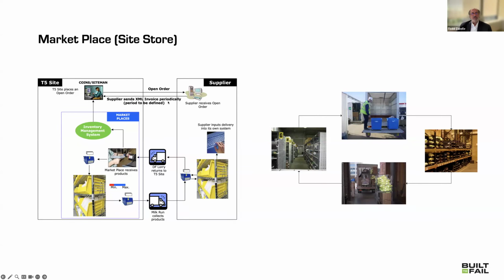But a purchase order was not the signal to ship something. A purchase order was the signal to transact. And I think this is what Dave was talking about, a relational contract that says, this is how we're going to operate, and we're going to put, I don't know, $1 million on a blanket purchase order to you. Okay. We want to see the invoices regularly, but that has nothing to do with what we're picking up. Okay. We don't need you to take any action. We're just telling you this is what we're going to do. And basically what happened was a milk run.